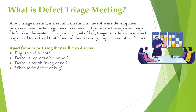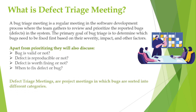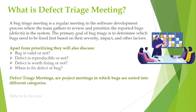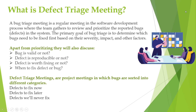In the defect triage meeting, bugs are divided into different sections: defects that need to be fixed now, defects to fix later, and defects that will never be fixed. In the 'fix now' category, those defects need to be fixed on an immediate basis — these are bugs which will create huge damage to the software or application, so they need to be resolved as soon as possible.